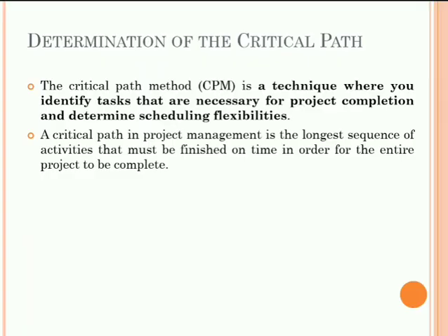The next step here is calculating the float. How to calculate the float, we will see in this step. Float, or slack, refers to the amount of flexibility of a given task. This indicates how much the task can be delayed without impacting subsequent tasks or the project end. Finding the float is useful in gauging how much flexibility the project has. The float is a resource that should be used to cover different project risks, that is, unexpected issues that can come up.